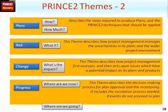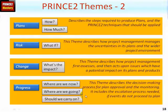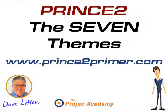The PROGRESS theme answers the questions: where are we now, where are we going, and should we carry on? This theme describes the decision-making process for, initially, plan approval and then the ongoing monitoring. It also includes management by exception and the escalation process, if needed, if tolerance is forecast to be exceeded. So those, then, are the 7 PRINCE2 themes.